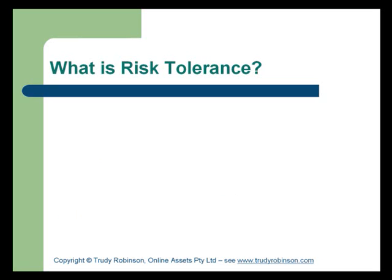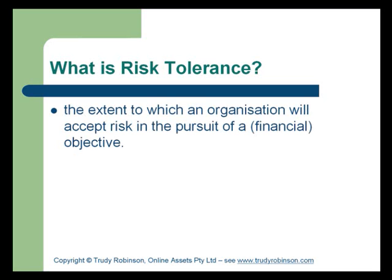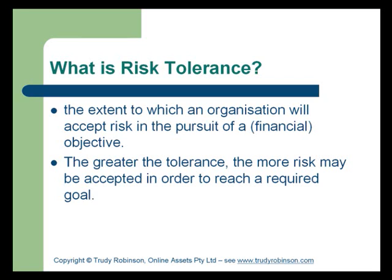Most organisations have some level of tolerance to risk. That means the extent to which that organisation will accept risk in pursuit of something they have specifically as an objective — whether financial or strategic. The more important that objective, the greater the tolerance may be. An organisation may choose to accept and manage risk in order to achieve a required outcome. An example may be the strategic intent of entering a new market, such as taking over another organisation. The risks involved might be substantially high, but the overall objective of meeting that strategic goal may override the risk.